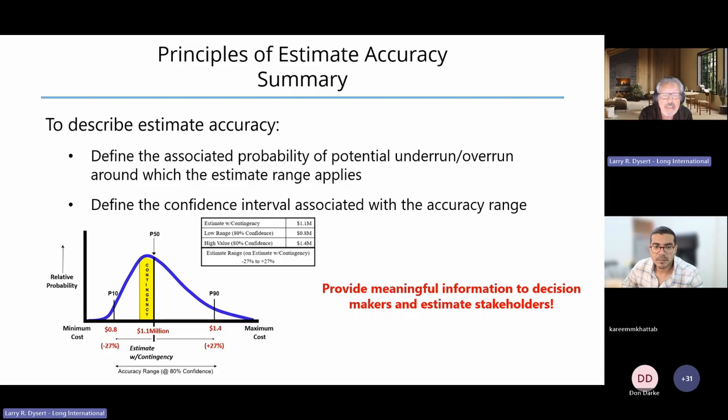What about piping quantity growth? But we don't do it at the individual line items of the estimate. If we do, then we're going to have too many things included in our QRA analysis, especially if running through Monte Carlo simulation, and we're going to underestimate the potential uncertainties and the contingency values that we end up assigning.